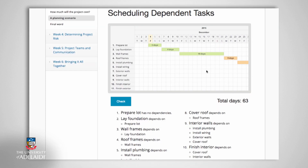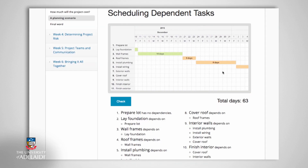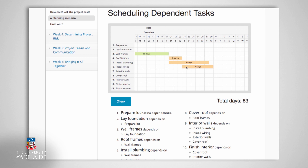The key to reducing the schedule is to identify activities that do not have dependencies — in other words, activities that can start without waiting for another to be completed and can occur at the same time as others. In the next activity, prepare your project schedule by considering any dependencies and realigning those activities that could be completed at the same time. Note that you cannot change the duration of the activities. Your objective is to consider dependencies in order to reduce the overall project duration.